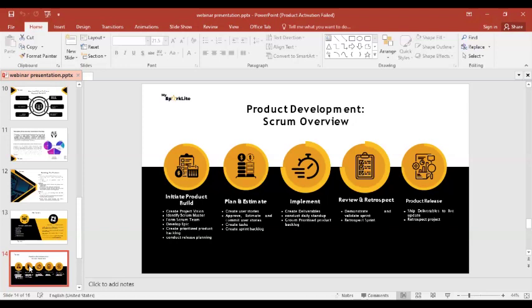Because you have designers in the midst, you have Scrum Master in the midst, you have the product development team in the mix. That's where you now see a front-end developer, back-end developer, database developer, as the case may be. So all of these people, when you combine the total number, it is expected that it should not be less than 6, and it should usually fall between 6 to 10. But that is just the normal ideal case.